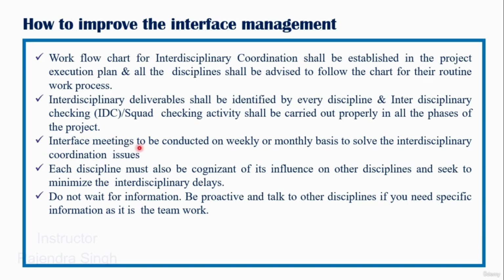Thirdly, interface meetings to be conducted on a weekly or monthly basis to solve the interdisciplinary coordination issues. So nowadays, good engineering organizations are working hand in hand, and weekly meetings are being conducted with the consultants and the clients, or the lead offices with the satellite offices, on workshare platforms, so that all the issues are addressed immediately and action points are laid down and the points can be closed on a very immediate basis, so that it does not impact the schedule, timeline and quality of the delivery.